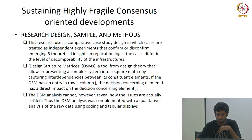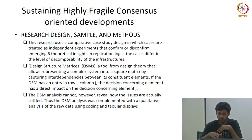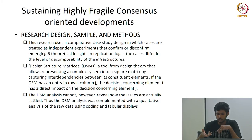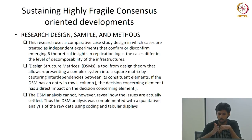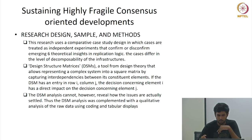Cases differ in the level of decomposition of the infrastructure. For example, in the London Olympic Park there will be different types of structures — a football stadium, a swimming pool — whose designs are not interlinked. But for a railway station, the design is more interlinked because the same train passes through all stations. For an airport, it is hyper-interdependent: a runway and the passenger tunnel depend on each other's design, but not on the parking or the hotel outside.